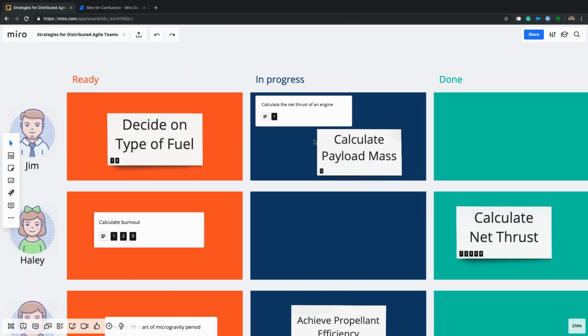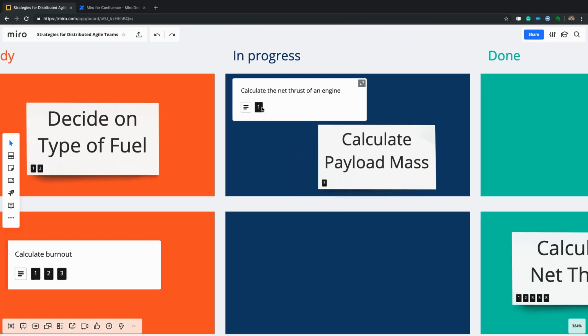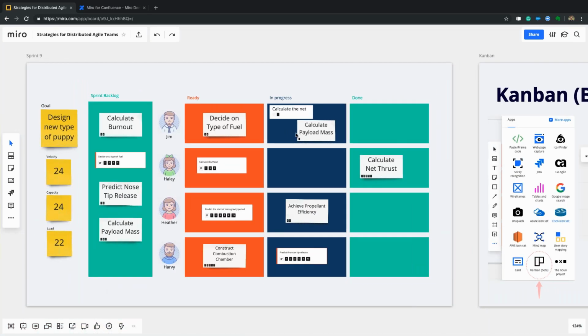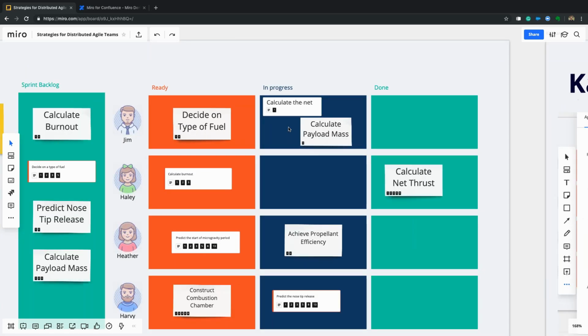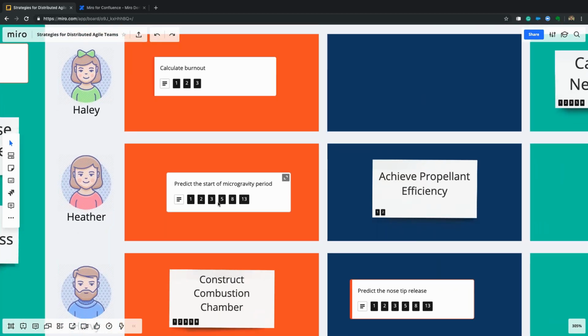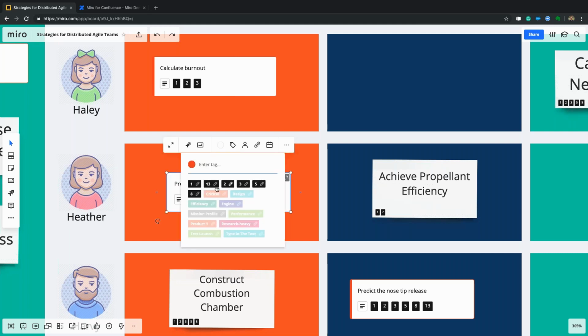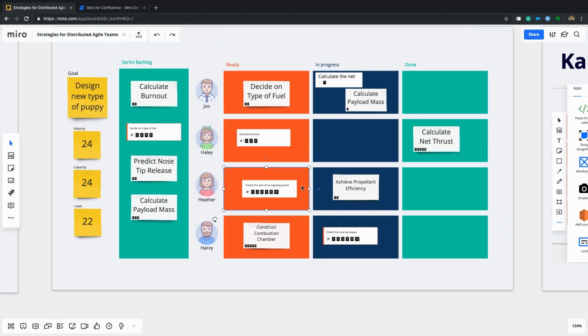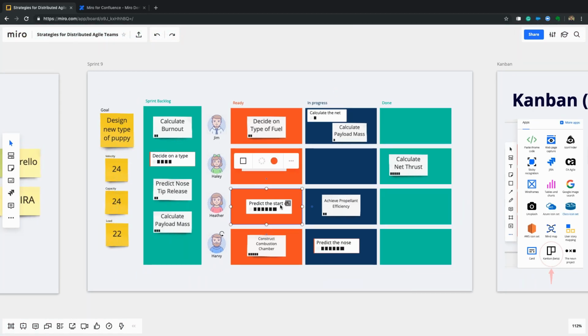One thing that I learned from one of our customers is that they struggled with tags because once you zoom out, you lose the information besides the color. And if you're doing something like user story points, you're not going to have a different color for every story point. You know what I mean? So what they started doing is they started doing it more like this, where if it's 13 story points, they have every single one on that card there, going up to 13. So that way, when they zoom out, they can still see that this is a heavy story. It's a heavy task to complete.